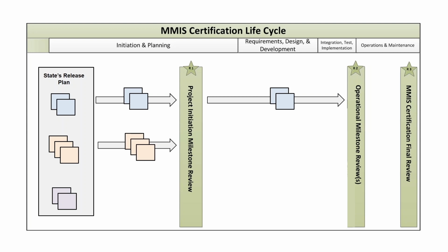After 6 months of operation, the first cohort of modules is eligible for final certification milestone review, provided the system has been running in accordance with all federal regulations and is meeting the criteria found in the checklists. Once the modules pass this review, the state can start collecting operations and maintenance federal funds participation for those modules. The process is very flexible. These kinds of high-level milestone review plans are decided between the state and CMS during the first activity in the life cycle.